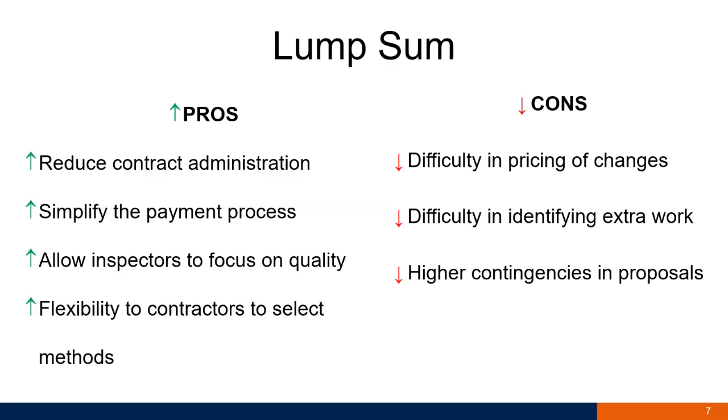So they always tend to put more money just to account for the uncertainties that might happen in the future. And it also requires higher design quality from the owner, since you don't want the contractors to put more contingencies in their price proposals.